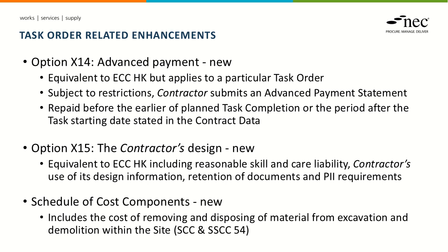We've introduced flexibility within the contract around advance payment to do with tasks. So this is only to do with tasks. This X14 is the equivalent of the ECC Hong Kong edition, where, depending on the restrictions, there are a number of restrictions within the clause. Under certain circumstances, the contractor can request an advance payment. And if they want to do that, they submit what's called an advance payment statement, which sets out the sum of money to be paid up front.